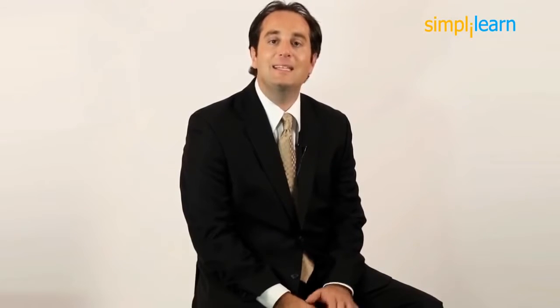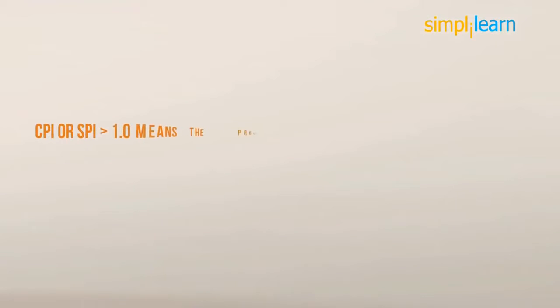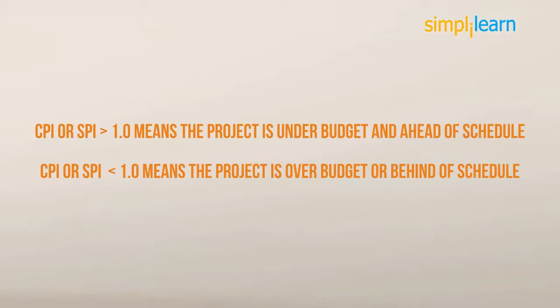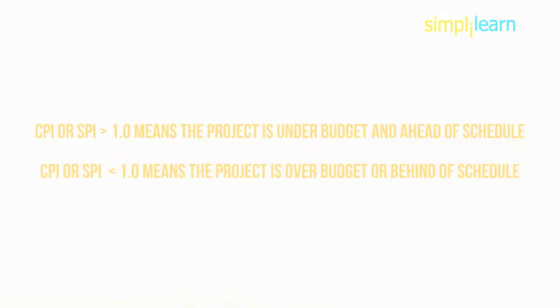Understanding your initial budget, the actual cost to date, and the forecasted cost to complete the project are the key concepts within EVM. Take some time to get comfortable with the Cost Performance Index, or CPI, and Schedule Performance Index, or SPI, that is referenced on page 219 of the PMBOK and in the course material in Lesson 7. The number reflects the percentage of the cost or schedule that is expected at that point.